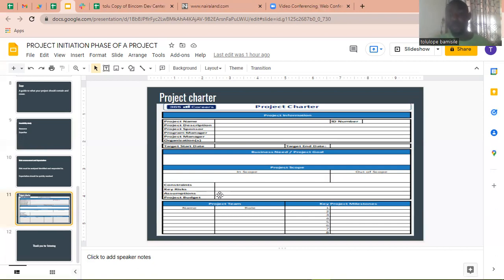Milestones. Let's say I'm building a house. Laying the foundation is a milestone. Then building the ridges is another milestone. The other work that will still go on before you lay the foundation, you dig and stuff like that, those are tasks. But after the foundation is done, you have reached the milestone. After you have built the ridges, that's the other milestone. Each phase that puts something out for you to see is a milestone. You list out those milestones to achieve before the project is done.